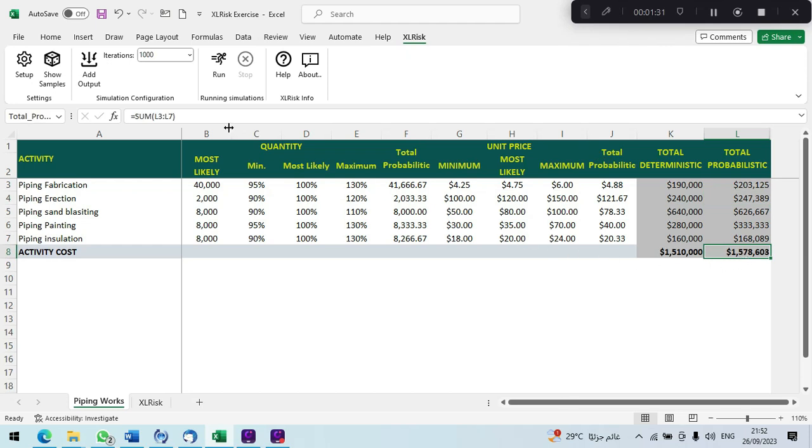And then we say, okay, let's run a simulation of 1000 iterations. Now you see the values are iterating, giving us thousands of iterations. In each scenario we are assuming a different set of values and getting this data. That is the essence of Monte Carlo simulation. You can do thousands and thousands of iterations that cannot humanly be done by a human being, but can easily be done by software.